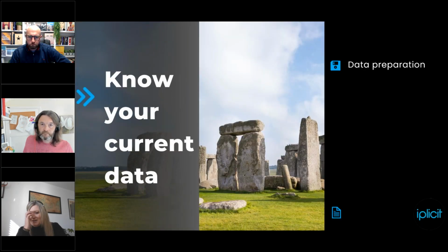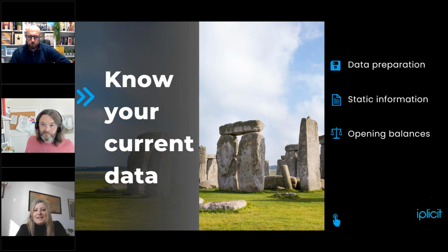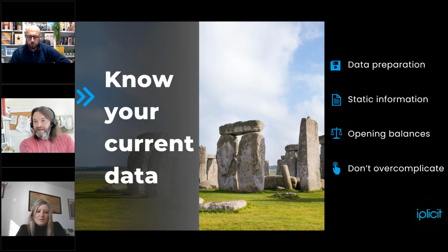So, your data. Big topic, data. First and foremost is what can you get out of your existing system? It might sound really obvious and really straightforward, but I can assure you, with the number of systems we've moved people from to iplicit, too many assumptions have been made early that the data would just be easy to get out. No one's tried it actually. And when it comes down to it, there could be formats incorrect. The system might hold data in a particular different way. There are lots of things to consider. And as I say, we step through and help you and point you in the right direction of things to consider.